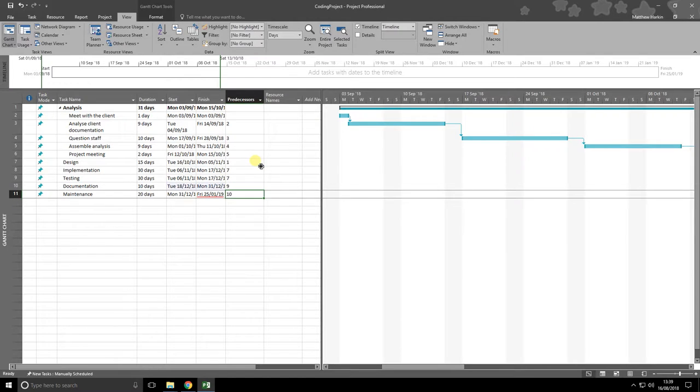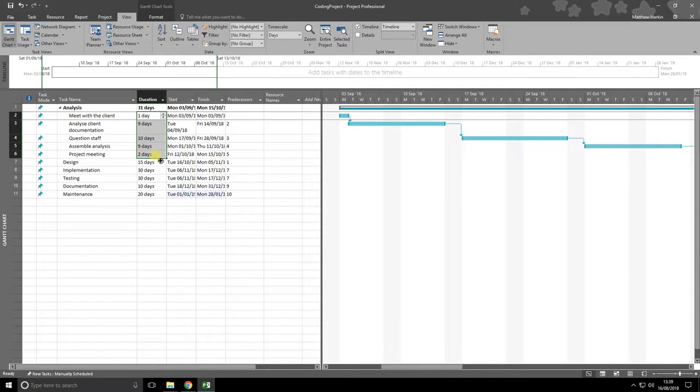That was a 9. It's just basically saying something went wrong earlier, but now I've fixed all the red error messages and they went away again. So that happens if you're altering it. Don't do what I said in the previous video, just do what I just showed you there. From there down to there, they add up to 31 days, so I had to change the analysis task to 31 days as well. That knock-on effect was just seen in this example.